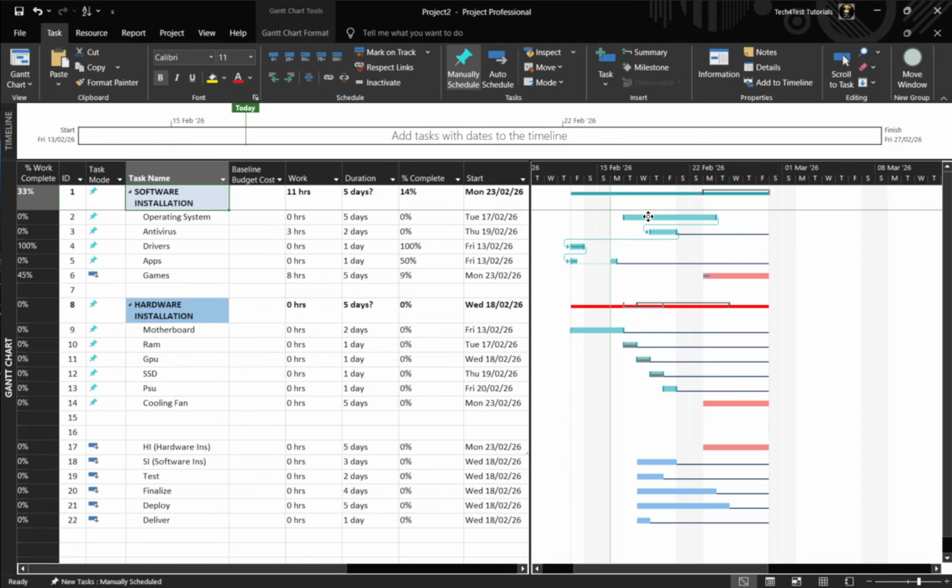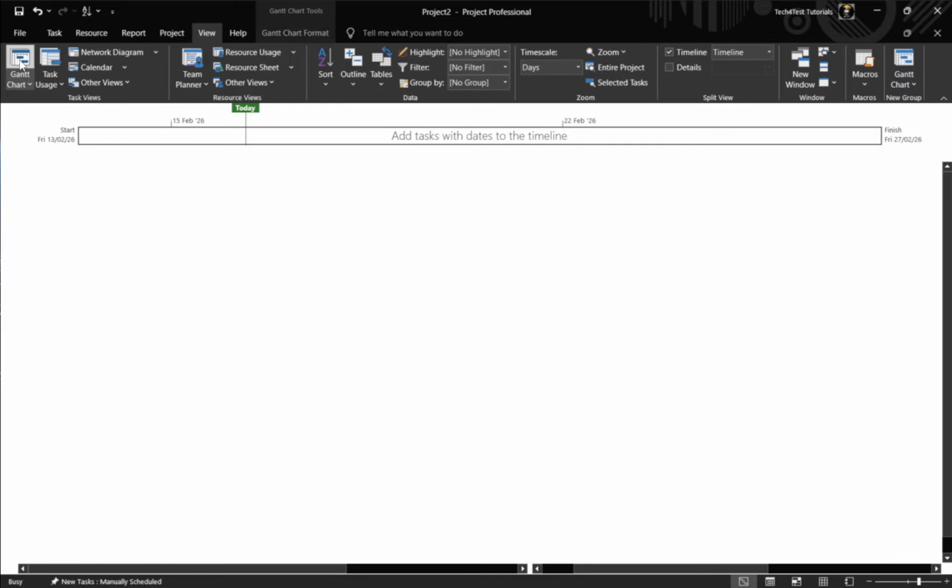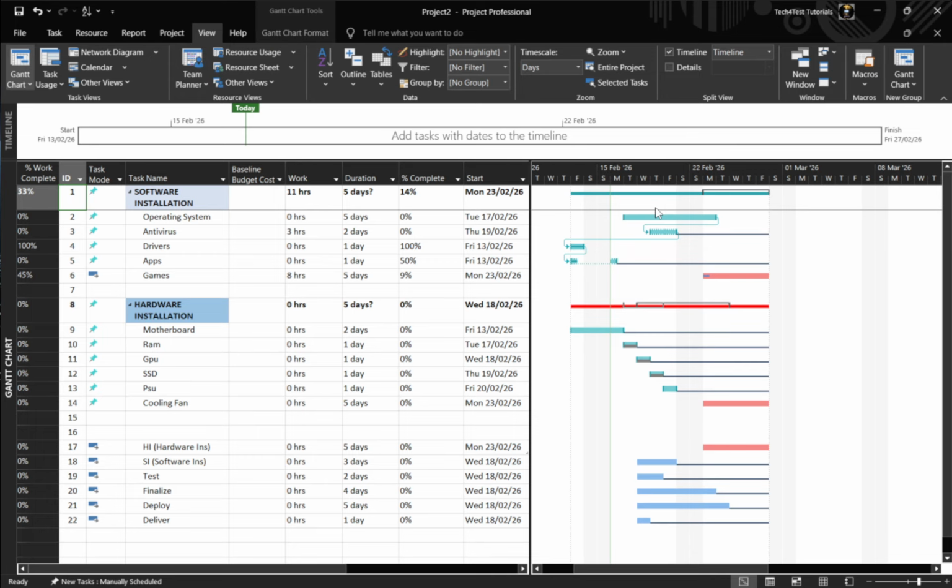On the Gantt chart, the task bar is divided into segments, and a dotted line between them marks the break where no work is planned. Start by switching to the Gantt chart so you have a clear visual timeline to work with. Go to View, then choose Gantt chart. This view is key because it's where you'll create and position the split precisely along the calendar.